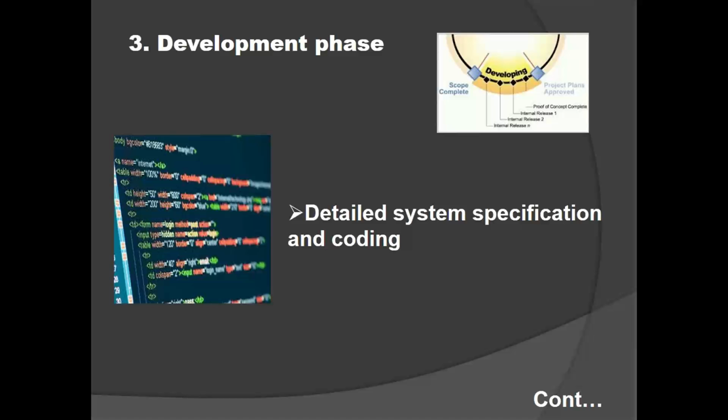In the same way, if you complete in 22 days in spite of 20 days, then also you have to give a reason why you have taken 2 days extra, whether the client has increased any requirements, whether any resources are not coming to the office, whatever it is. So in this way we will do forward traceability and backward traceability.